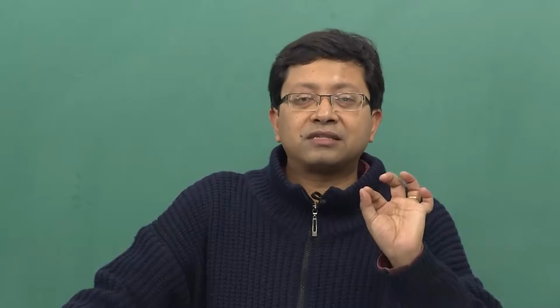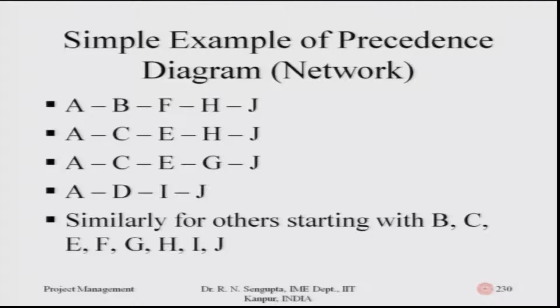But it would also mean that B, C, and D may start at the same time, or may start at different times. Let me say that in simple words. It may mean that B can only start after A ends, but that may not be the case for C. C can be such that C starts only after A starts. So the starting points of B and C are different, and D can be, for example, such that it only starts after half of A is complete. How they are denoted in the diagram concept, I will come to that later on.